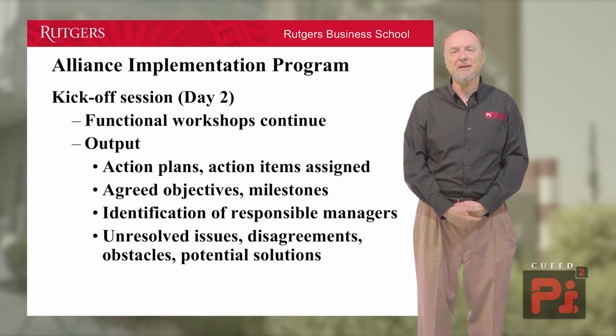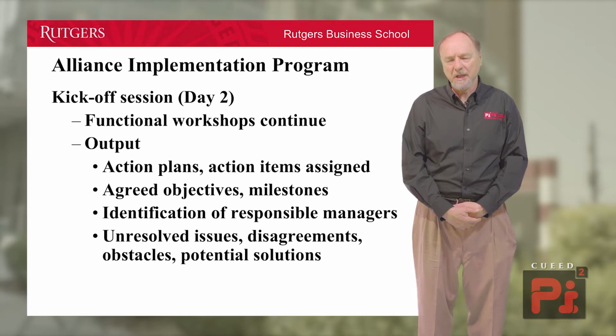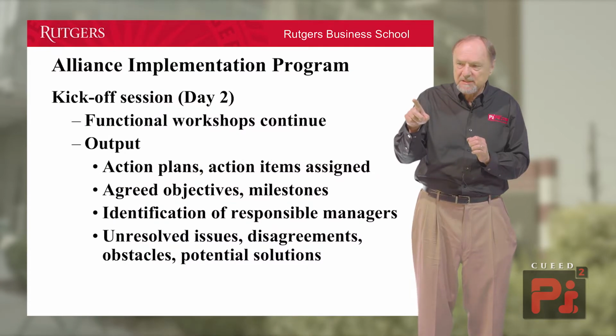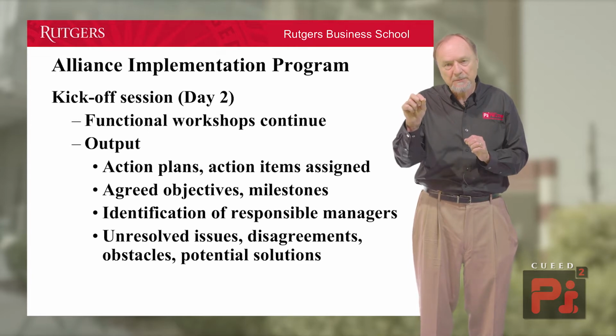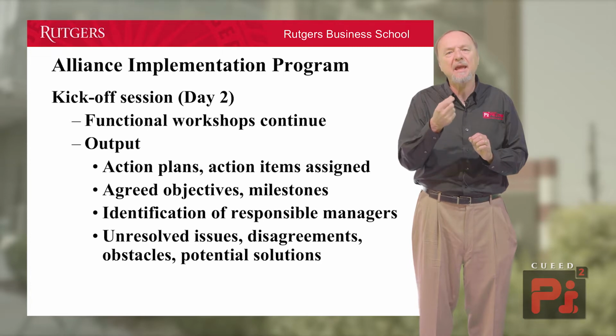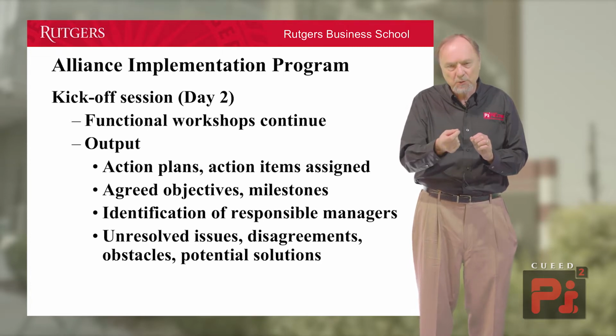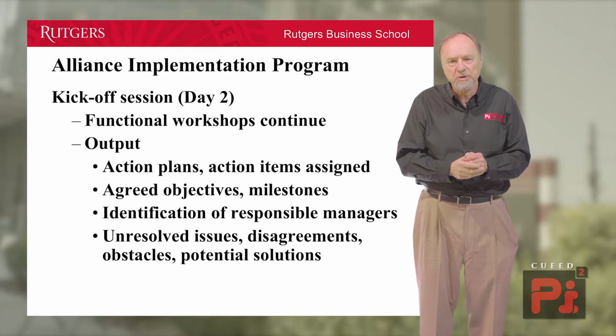What I want to do now is talk about day 2. What do we do in day 2? Day 2 is really focused on functional workshops. There's a lot of work that has to be done. But I want to encourage you to make sure that the functional workshops result in these outputs. We're looking for action plans and action items assigned to individuals, agreed objectives and milestones, identification of responsible managers, and any unresolved issues, disagreements, obstacles, potential solutions.